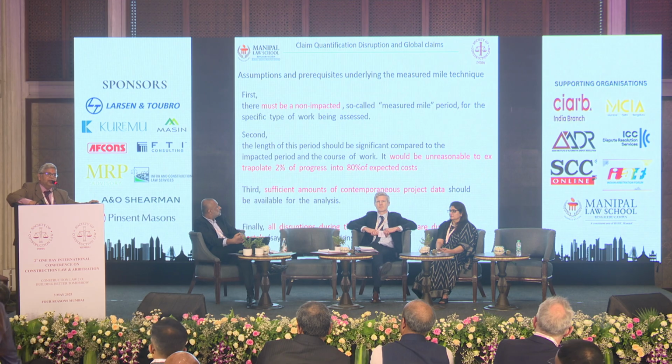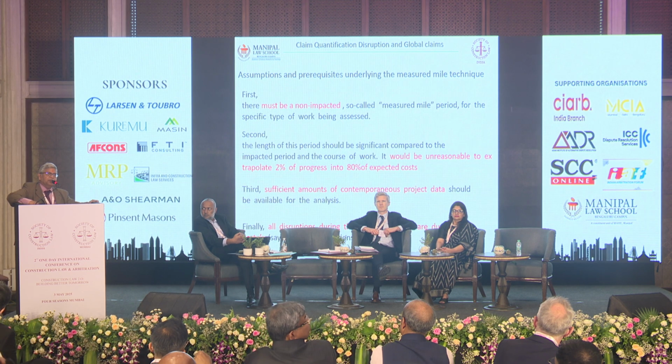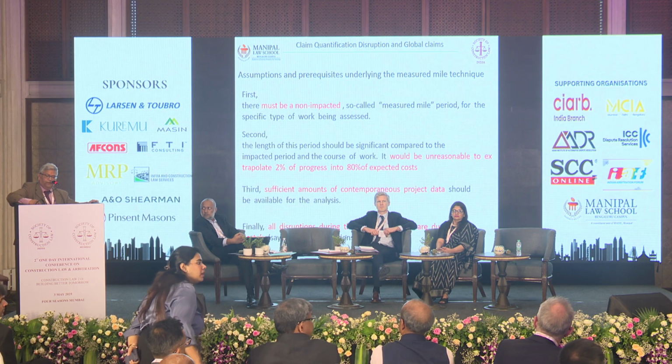We did not prepare them today. These are all contemporaneous records. You could see that this period to this period, there was a huge disruption. These are all the causes, and because of which the contractor is entitled for a compensation.